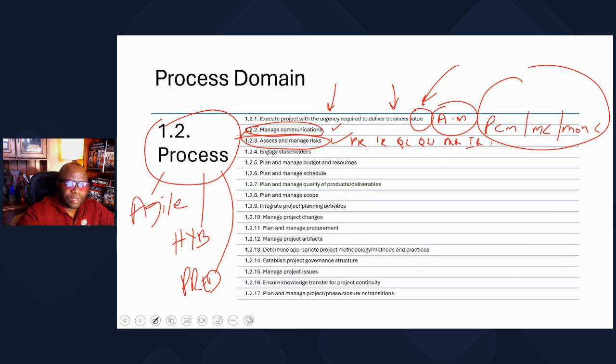the responses, monitor risk. And when it comes to planning risk responses, you got to understand that you have negative risks or threats with the A team approach. A team just means avoid, transfer, escalate, accept, mitigate. That's for the negative. And then for the positive risks, you have the easy mnemonic. You have escalate, accept, share, enhance, exploit. And you got to understand how these are different. There's subtleties and some keywords.